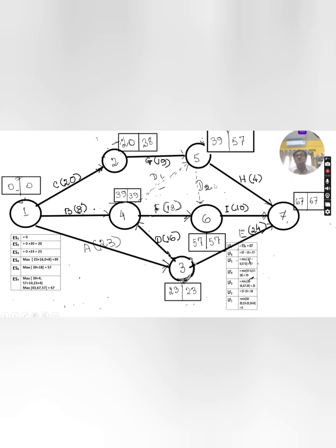I completed it. Now 6. Which are the activities attached to this node? 4, 6 and 5, 6. Then what will be the earliest start time? If you move through this path, the earliest start time is 39, plus the activity time 18, that means 57. 39 plus 18 is 57.